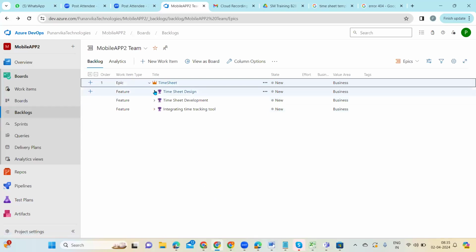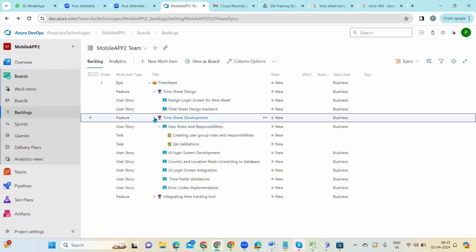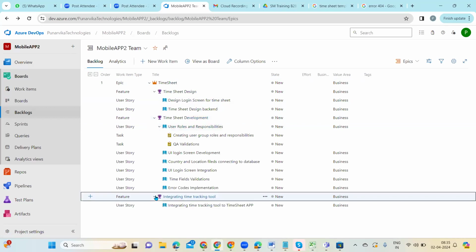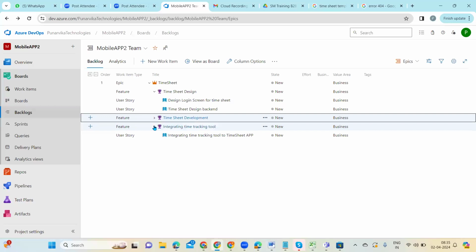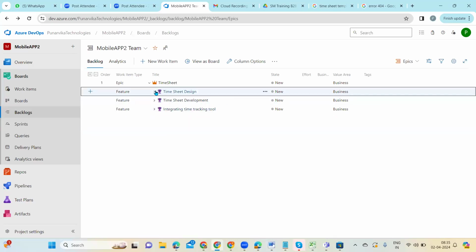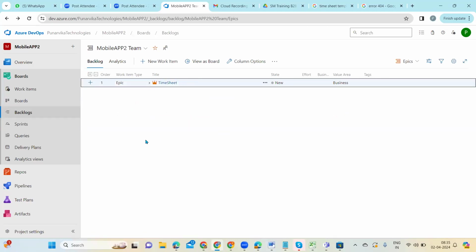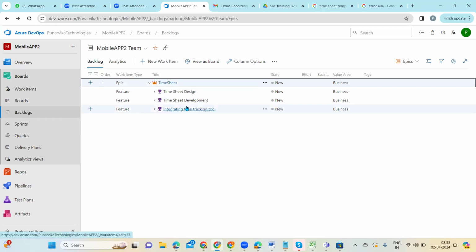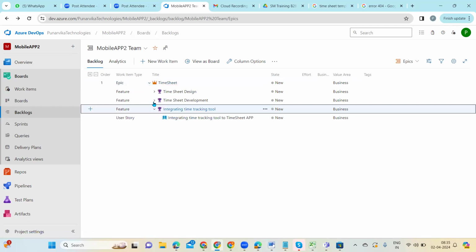In Jira, can we link like parent and child? No, we can't. It's only dependency we can do in Jira. Linking is different. So for a user story, you can add any dependency user story. You can add bugs, but it won't be a kind of parent. Here, it is purely a hierarchy.